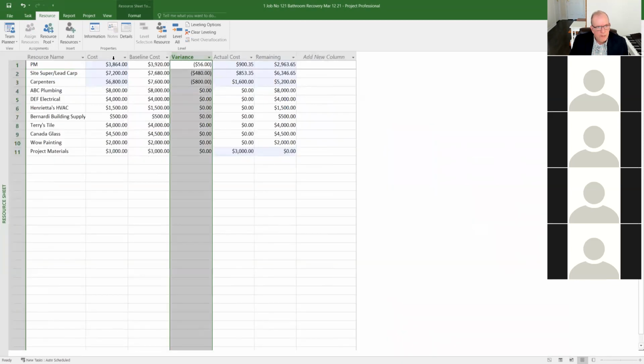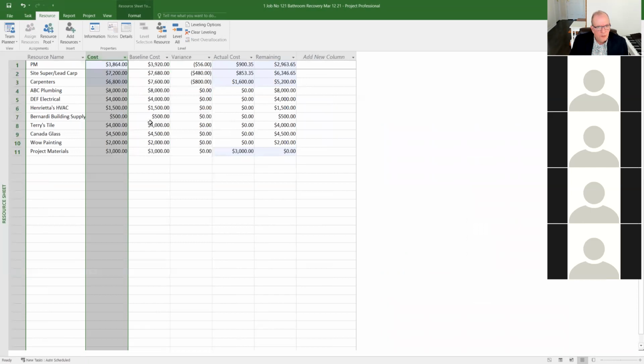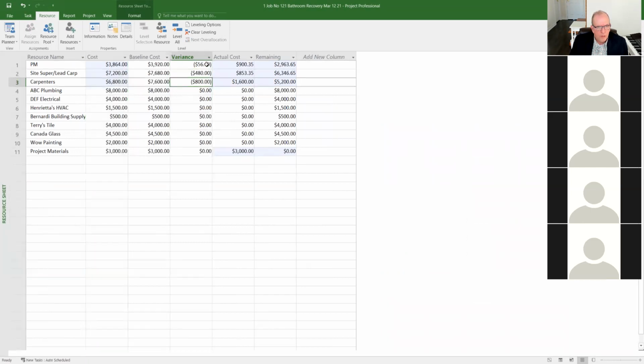And so we can see the variances here, right? So we're pretty much winning on all of them at this point. I know for sure before, if you go back, because remember, we've got that update file. You could always open the update file and see what were we at. And then you can look at the variance file and say, oh, on the update file, we were this. Now on the recovery file, we're that. You could see the difference from file to file. So you could always look back. That's why we save it at different points in time. That's why we had the update file.